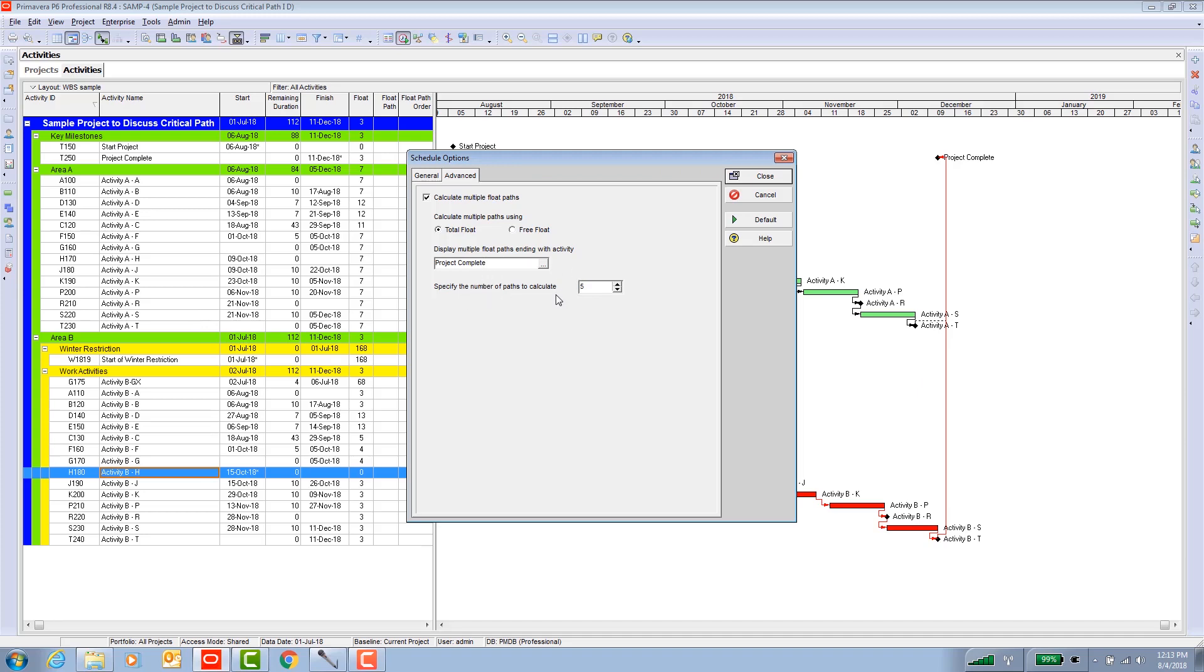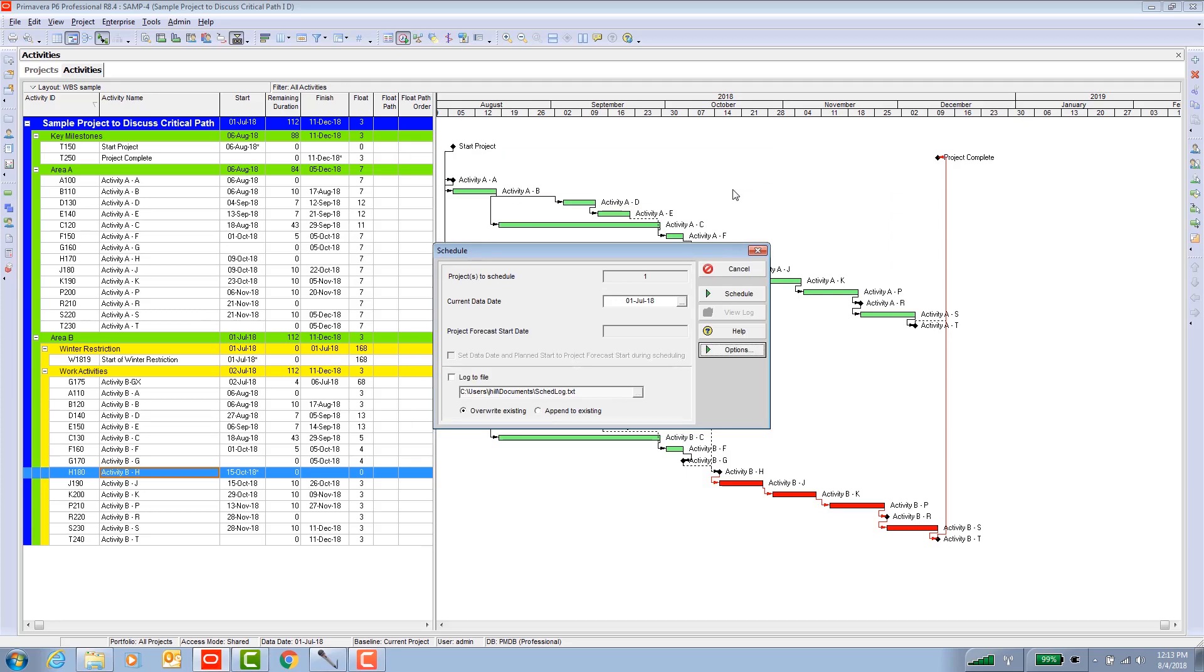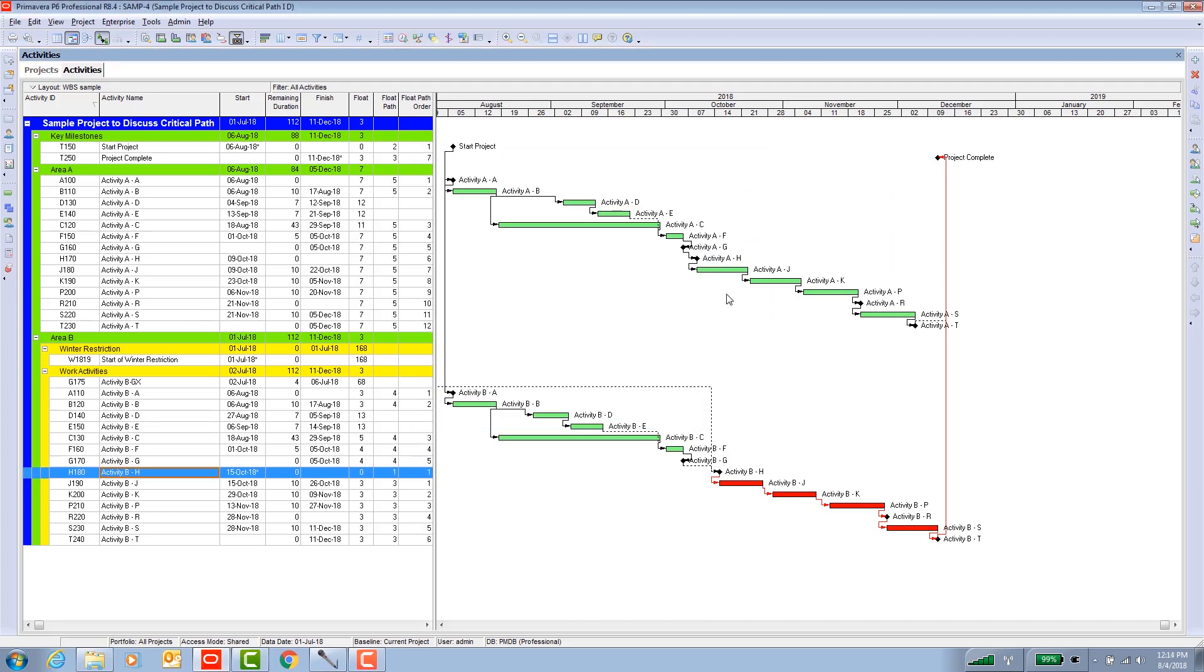As far as the number of float paths, I'd recommend a handful. That usually gets you what you need to see for the activities you're interested in. You can't say one because whenever there's a split in a path coming backwards when the paths merge with other non-critical paths or lesser critical paths, Primavera needs to give them a unique number to keep it all straight. So start with a handful and see what that gets you. Okay, so let's close that. Let's go ahead and hit the schedule button. There we go.